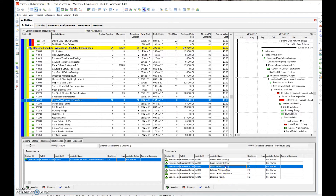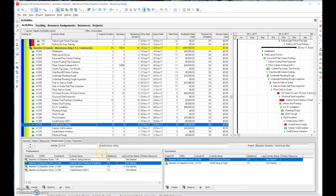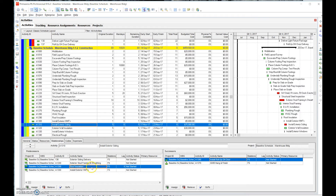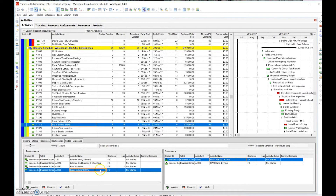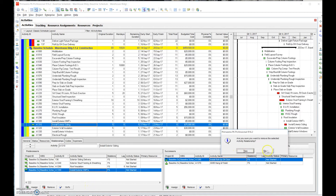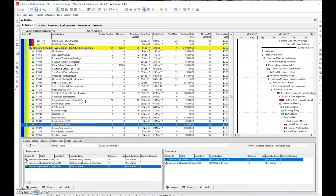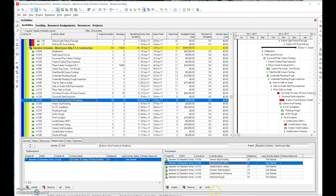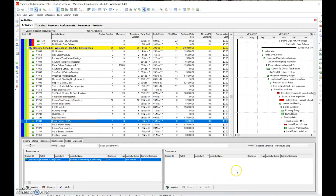Going back and looking at install exterior siding, you can see there are a lot of different predecessors here: exterior siding delivery — that's okay; exterior stud framing — that's okay; roof insulation — we may need to remove that predecessor. And install exterior HMF: if you look at it, that was actually a predecessor or successor to the activity exterior stud framing and sheathing. So if we remove that, we could potentially reduce a redundancy there. Let's go back and make sure we still have a closed network. We actually removed a relationship there.